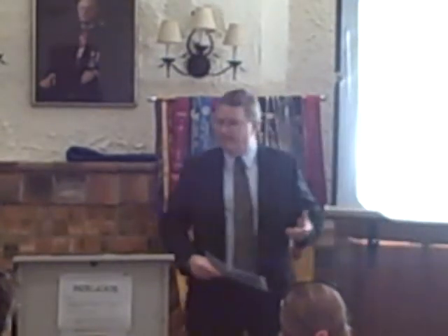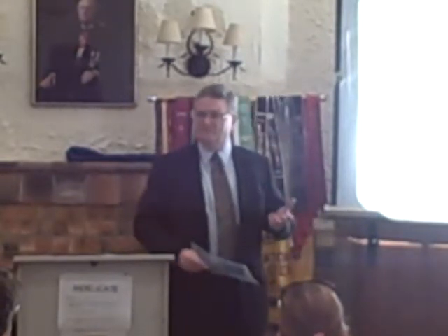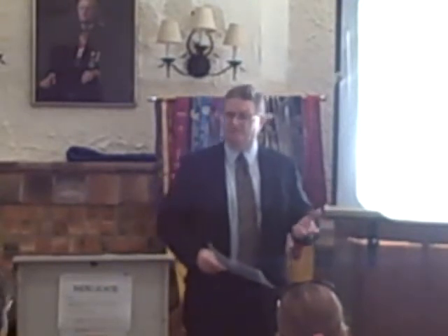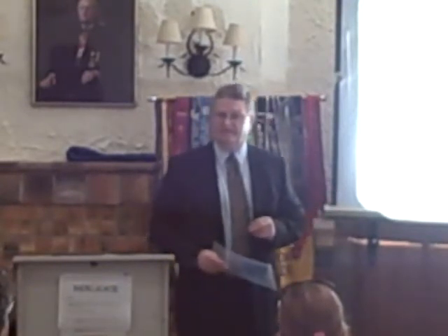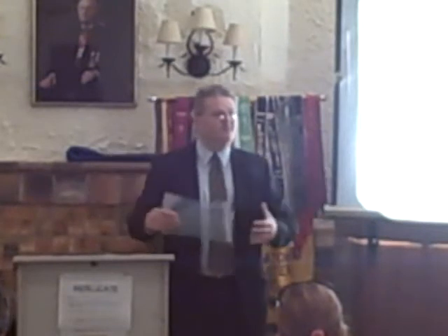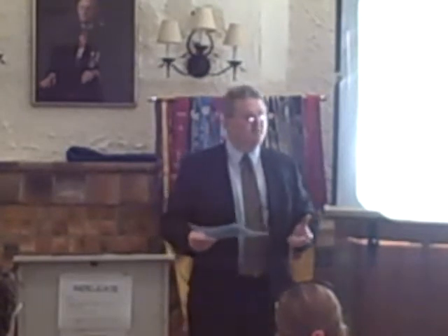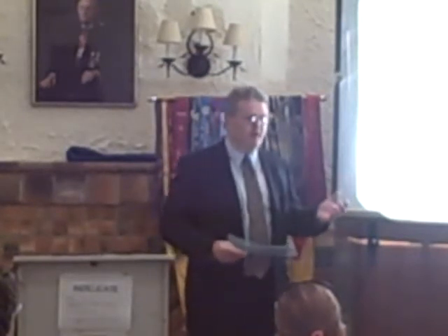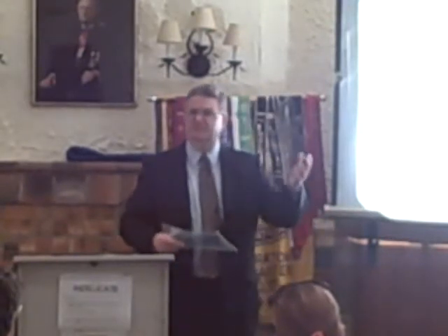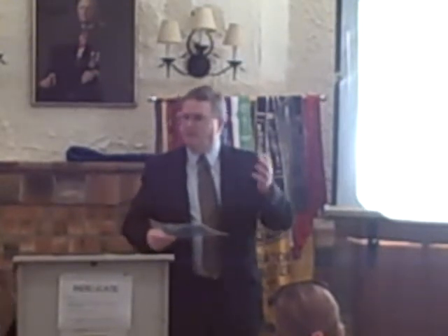There are some basic steps for doing a potential problem analysis. It's really pretty simple if you allow yourself the time to do it. Firstly, we identify potential problems. 2 steps to that. First, we need to decide what action we are looking to protect. That helps us focus our attention. Then we determine what kind of things could go wrong. Those are potential problems that we're looking for. Having done that, we ask ourselves, for each of these potential problems, what are the likely causes of that problem? And we list them down.